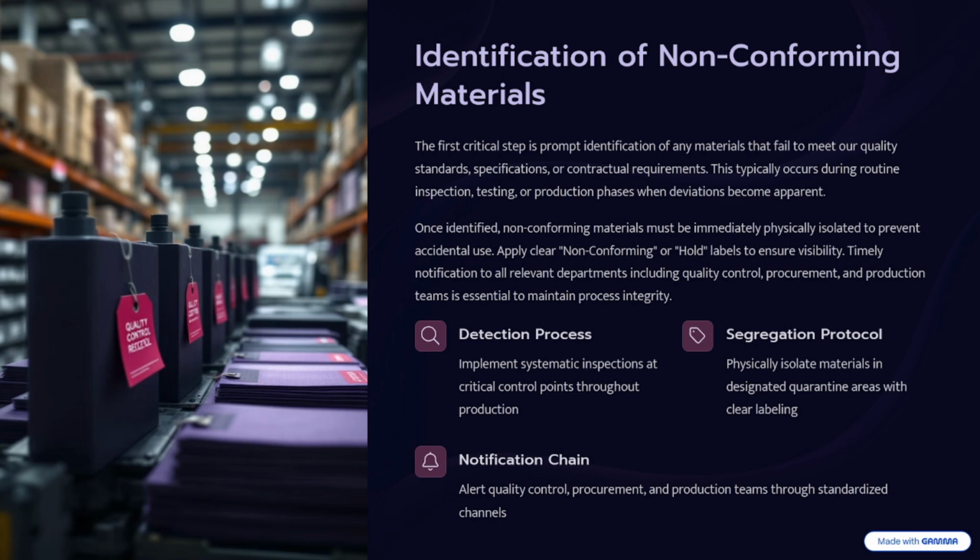The third one is your approved material submittal. In the approved material submittal, it will mention your supplier name, manufacturer, country of origin, bill of lading, and your schedule of material. If you have all this, you can start checking your material.